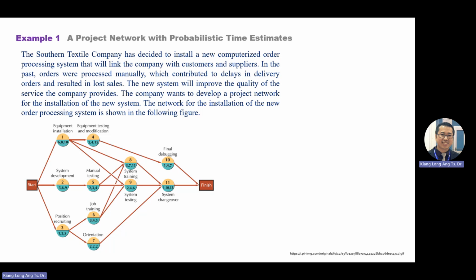Okay, so you have your activity here, and the time is below. For AOA, the activity and time are on the arrow. For AON, your activity is inside the bubble or inside the node. A general idea of a network is that from node to node, you cannot have a double arrow, or parallel arrows. So that's why in AOA you need to use a dummy. This one is wrong, so you need to use a dummy. And for the dummy, the arrow is dot shaped.